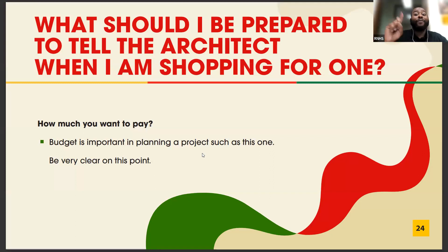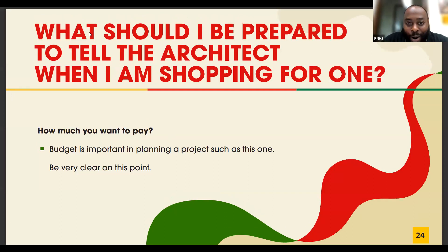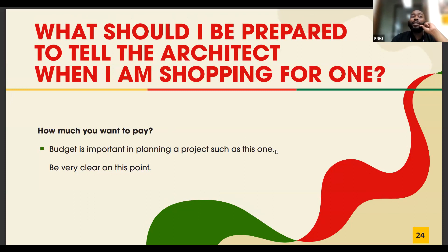The City of Oakland is currently short-staffed, especially since the new mayor came in and they're working to rebuild staffing. That affects permitting timelines. But using a pre-approved design still helps tremendously. Regarding whether there's a cost for a general contractor to come out and provide a quote — yes, there's usually a cost for a site assessment, which is part of your pre-development costs. Sometimes it's a few hundred, sometimes a couple thousand. Our program has a pre-development loan pool to reimburse those costs.